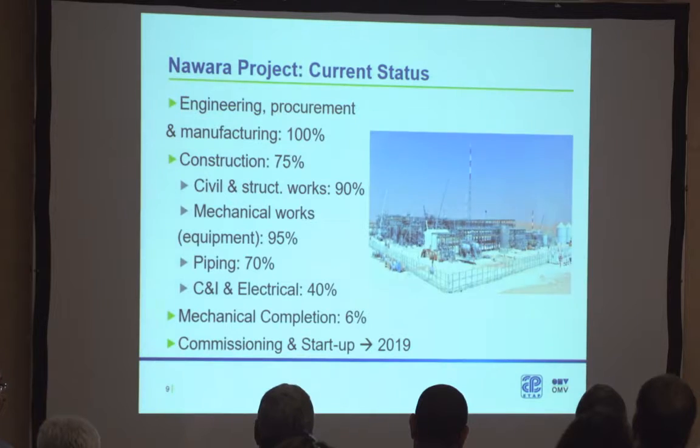I can come back to the question of colleague Salim about how we estimate the weight. There is a baseline and there is a weight for each activity, and there is a planner who follows up the activity. It is done monthly, how we calculate the progress and whether it is 70 or 90 or whatever.